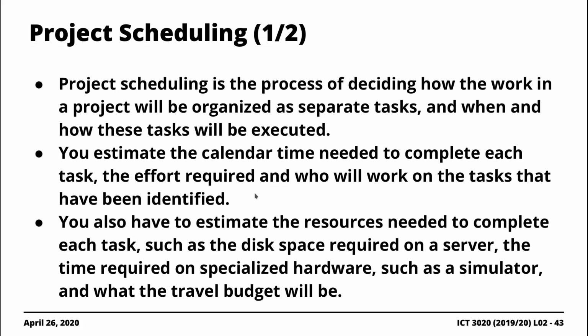You obviously also have to estimate the resources that are associated with the different project activities. And remember, we said other than the individuals or human beings that are going to work on the project, you're looking at resources such as specialized hardware that you might want to use, things like case tools, for instance, and simulators, depending on the type of project that you are working on. We already highlighted that it's usually the case for these long-term projects that people might potentially want to travel for training, for instance, or maybe travel to attend a workshop, right?